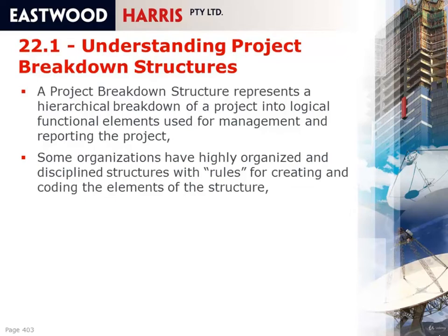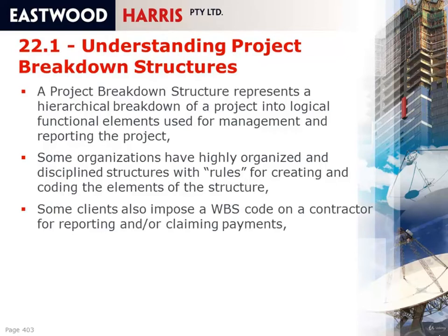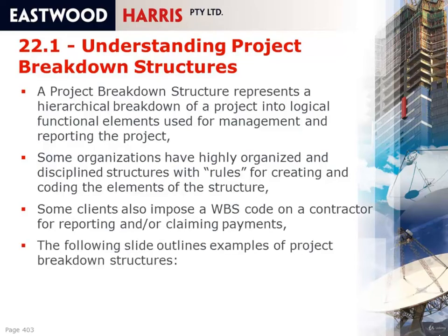The military is one example where they have a very disciplined method of creating the work breakdown structure and very strict rules about how you granulate out your WBS. Some clients impose a WBS code on a contractor for reporting and claiming their payments. The following slide outlines some examples of project breakdown structures.